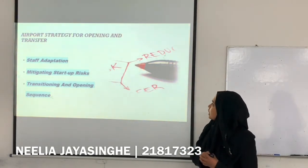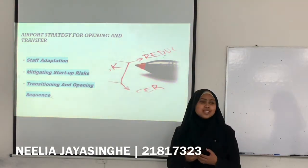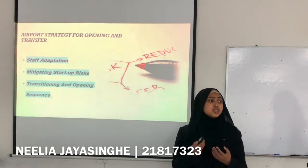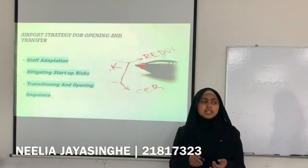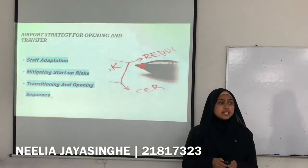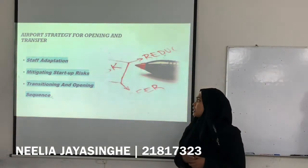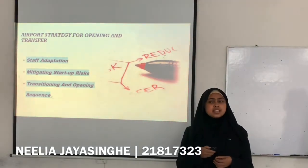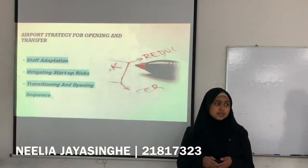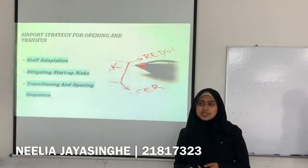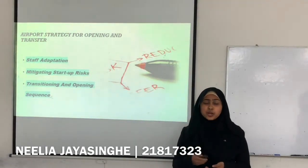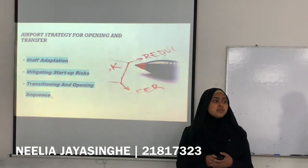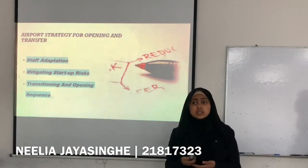Lastly, airport strategies for opening and transfer. When opening a new terminal, it is paramount that staff should be well trained and equipped to understand the new facilities that the terminal entails. They need to be trained and tested well before the opening date, or the Airport Opening Date (AOD). Next, mitigating startup risks — because of the expansion of the aviation industry, most equipment is technology-based and manpower is less, meaning there is a higher risk of equipment malfunction. Systems and procedures should be tested well before the opening date.